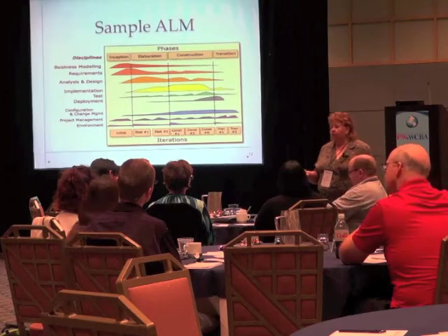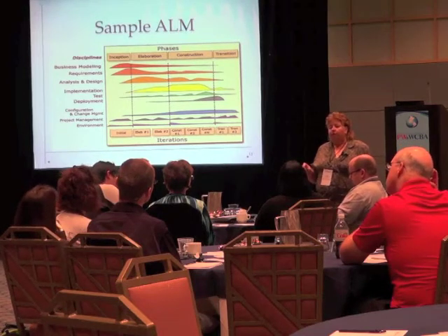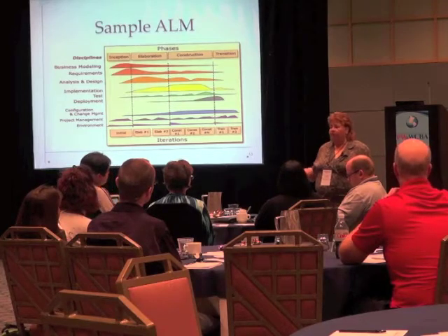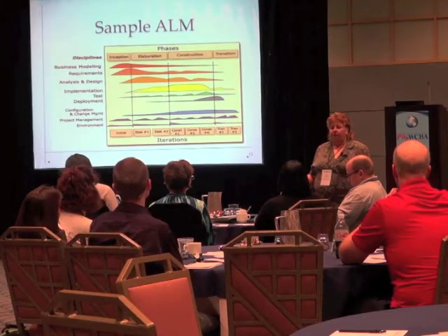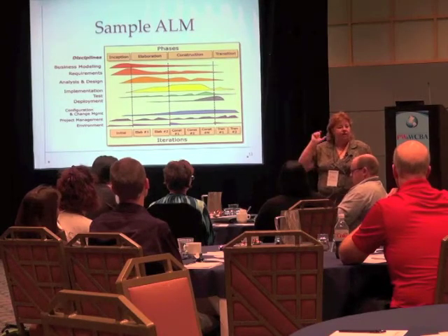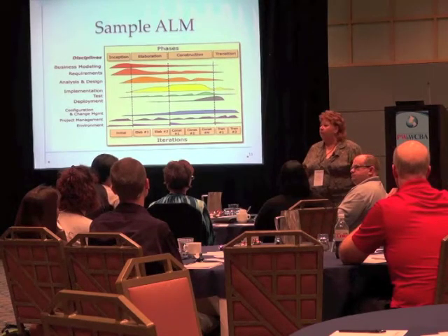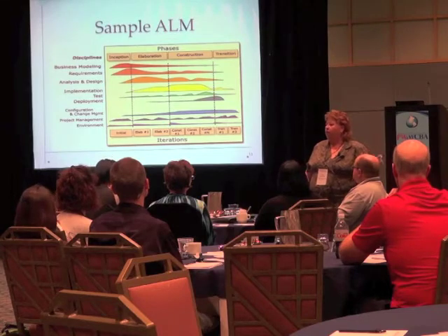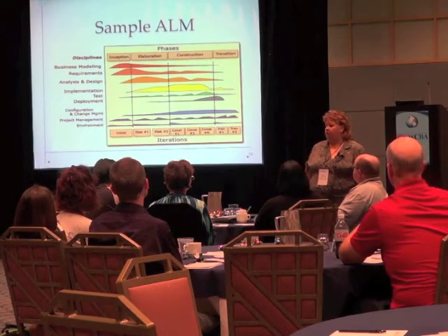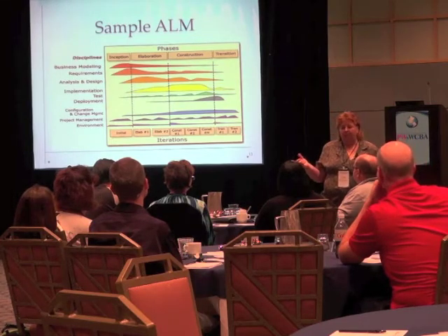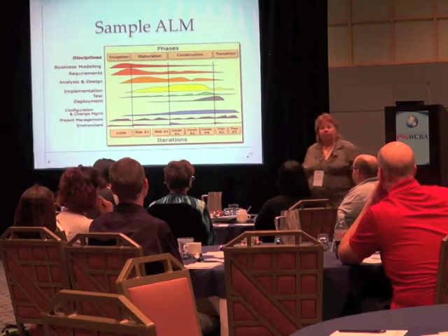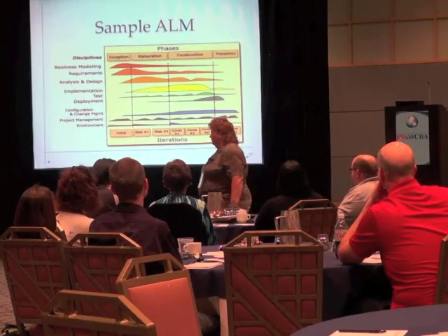Now, if you're doing prioritization and really trying to go after your high value items first, chances are that stuff at the back end isn't that sexy and really isn't all that important. And projects then get canned because they're not as valuable as the project potential coming in the door. And I let that be the stage gate in that scenario. And typically when that's happened, we also hadn't used up all the budget either, which was a good thing, because we saved it to work on some other projects.